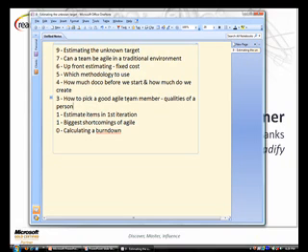Okay, not true. In a traditional environment, you still try and get a handle on what's involved, right? You have a look at the requirements and you try and figure out using function point analysis or all that sort of stuff to try and get a handle on it. It's effectively the same as what you're doing with an agile project. You're trying to get a handle on the amount of work involved by the number of function points, story points, relative sizing.